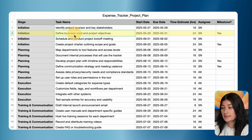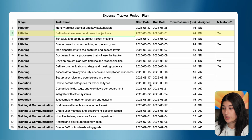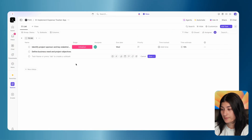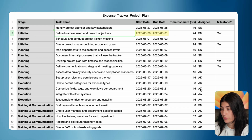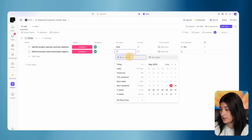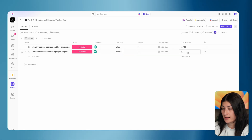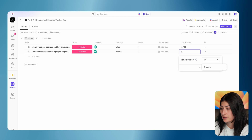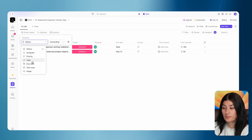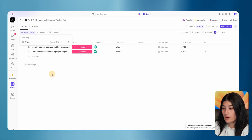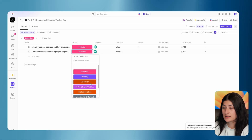My second task is to define the business need and project objectives. I'm going to add it in here, set the stage, my assignee, my dates — let's say May 29th to May 31st — and then my time estimate. I'm going to estimate for this to take five hours. And then what I'm going to do is group this rather than by status — I'm going to have this group by stage. Now as I create my tasks and put them in their respective stages, I'll start to see this build out. I'm just going to start creating my tasks and finish this up.